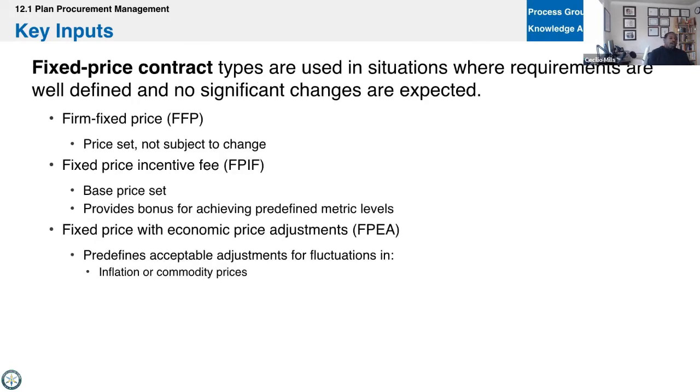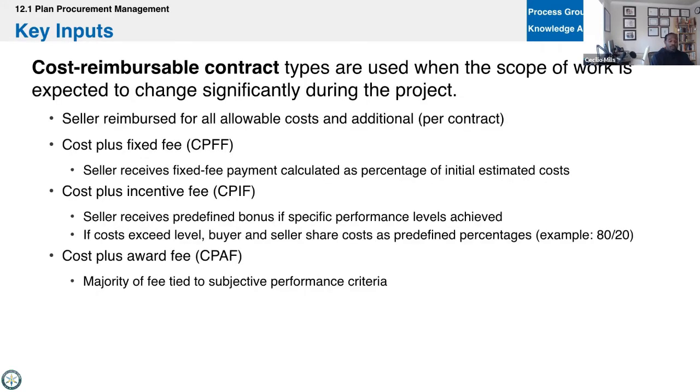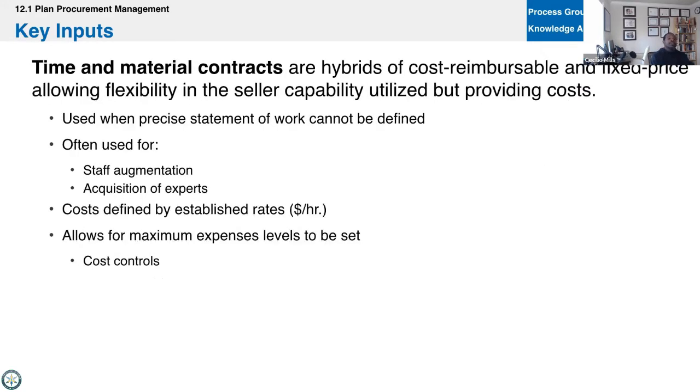Okay, and now let's talk about the contract types, right? There's 3 types: fixed price, cost reimbursable, time and materials. I'll start here and work backwards for these 3 slides. All right. So time and materials, hourly contracts. I think we're familiar with these. Even if it contains a not to exceed type clause, this contract is still most risky to the buyer. So you want to note this. The risk sits with the buyer in this type of contract. Okay.